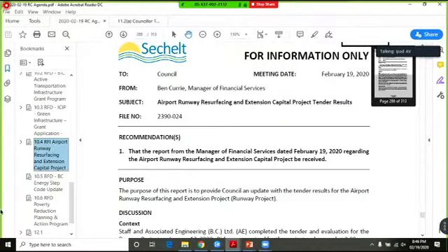That's correct. So the amount that has been allocated in 2019 is $346,000 of gas tax, and the new ask for 2020 will be $449,000. An additional $450,000 is required to complete the project. Thank you.